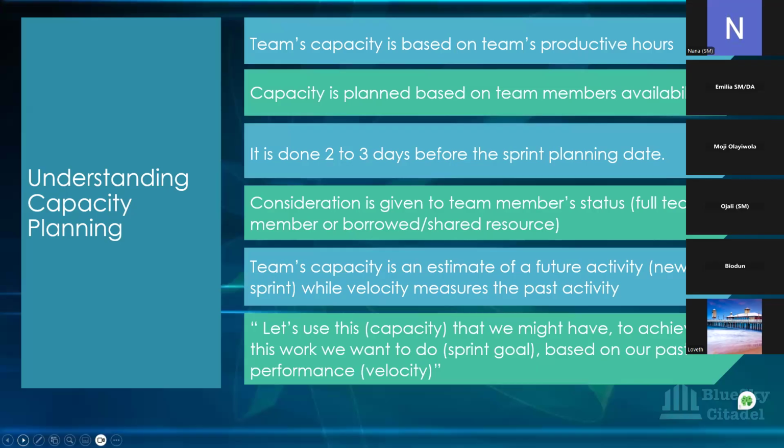It helps you to know how many of those data migration requirements you can bring into the sprint, and that is also what you want to promise the stakeholders that you'll be able to deliver. So you won't promise them that everything that has to do with data migration will be completed just because you have a data analyst. If it's a borrowed resource and not a full team member, you won't be able to do that. So those are some of the things you also consider.